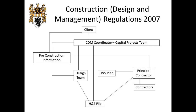CDM is a very simple set of regulations, or should be. We start off simply by having a client for the project — in this example it's Oxford Brookes University. We then have under CDM a thing called a CDM coordinator who coordinates health and safety, and in this case that's the capital projects team. Then we have the design team and Laing O'Rourke and the various contractors that work underneath them.